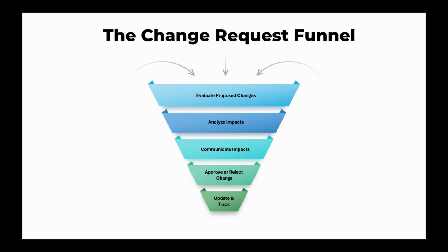As changes come in, they must be analyzed. Not every change is a good change, and so they should be analyzed by the project team to determine whether or not that change is beneficial, and this is the first step. If the team decides that the change is feasible, further communication would need to take place, not only to the leadership for a decision, but also to the people who will be impacted by that change.